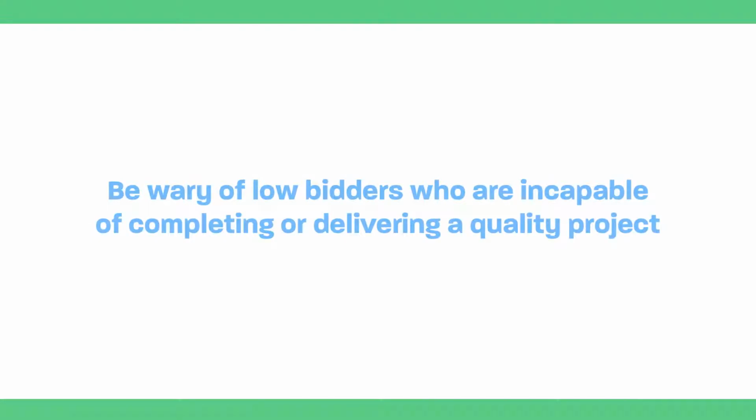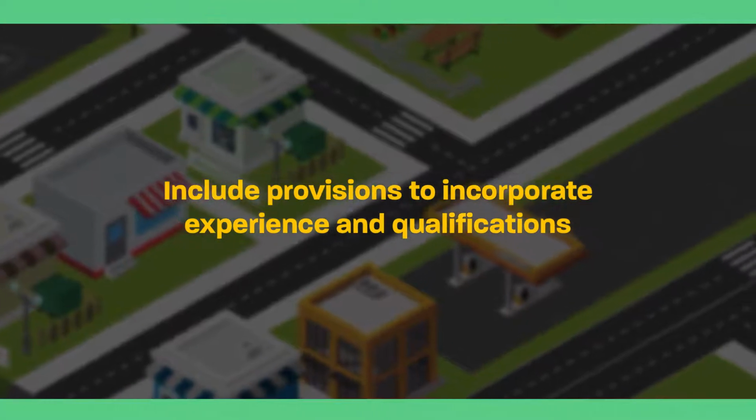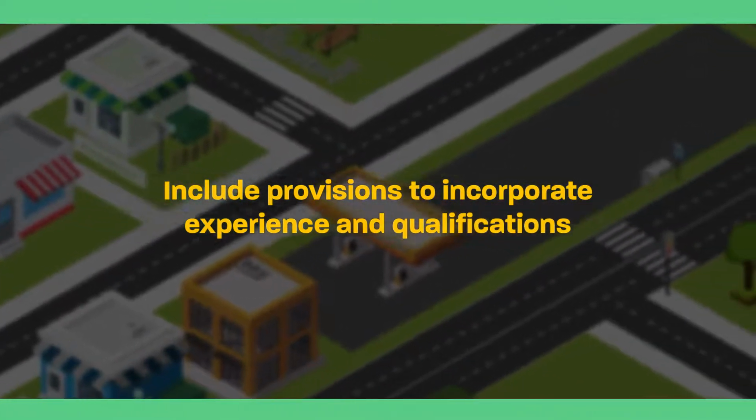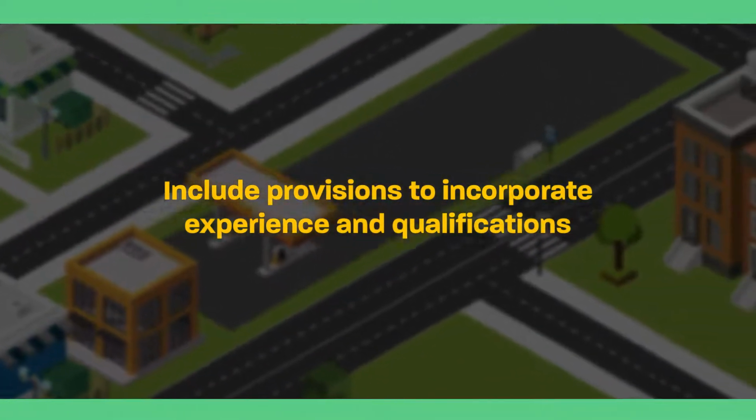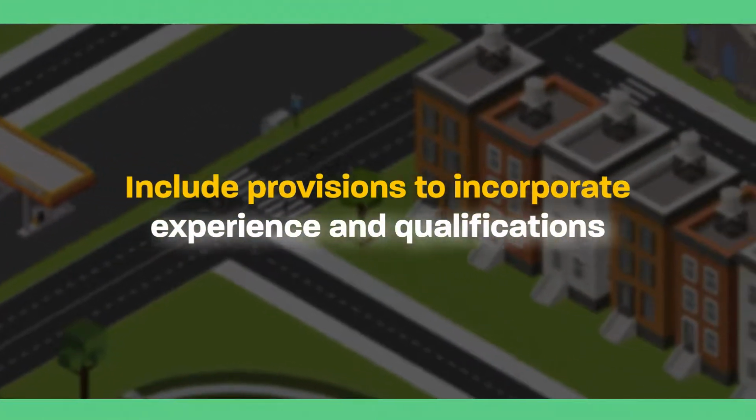As a rule, grantees should be wary of low bidders who are incapable of completing or delivering a quality project. To the extent allowed by federal, state, and local procurement requirements, include provisions in your procurement process that will incorporate experience and qualifications in selecting the contractor.